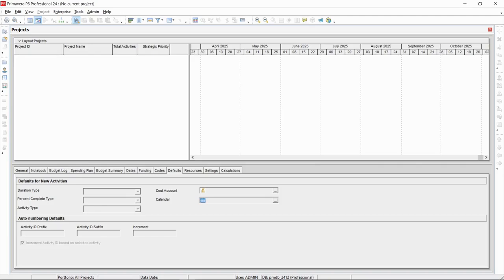You have just installed the Primavera P6 software and are ready to create your first project. However, before we start creating projects, it is important to organize our base properly, and this is done by creating the Enterprise Project Structure, or EPS. The EPS is the structure we use to categorize and organize all our projects within the software.